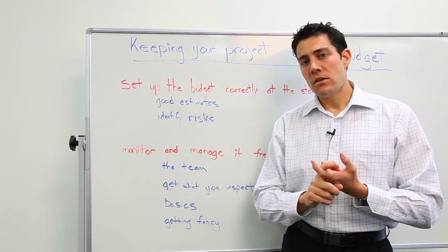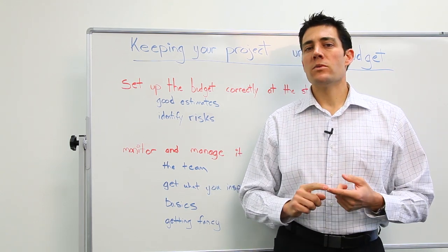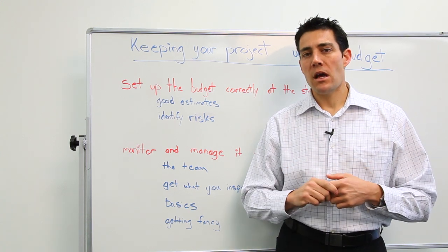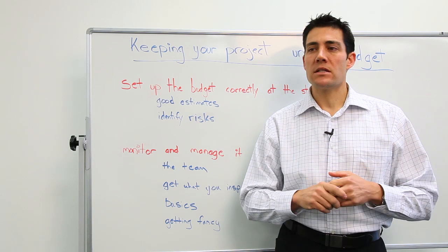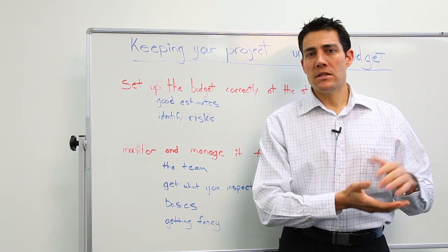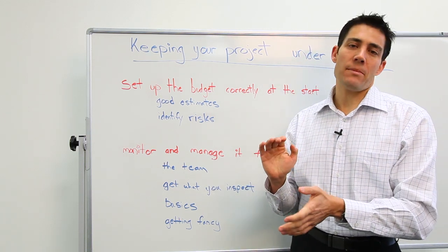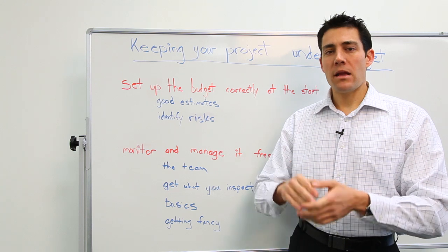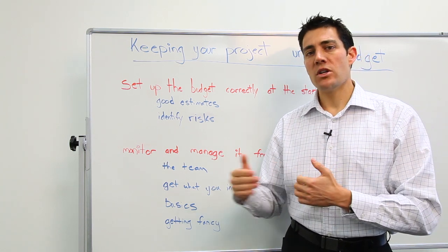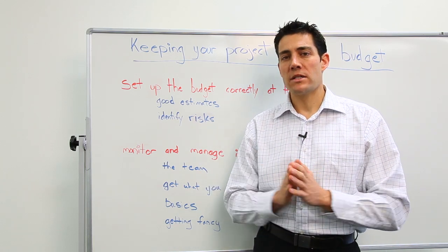I usually run 3 different types of estimates before I actually commit to a project budget. First one I do is a top-down parametric estimate. So I use past projects, I use different parameters the project's going to deliver, things like how many systems you're going to have to integrate with or how many end users are going to use your application. Multiply that by the number of effort or task required to achieve that deliverable, and out pops your answer. That's your basic top-down estimate using parametric techniques.